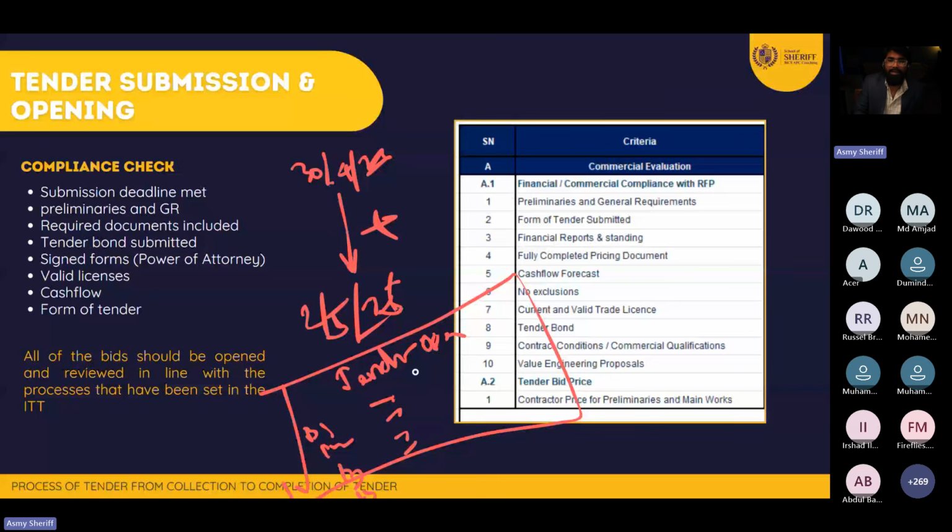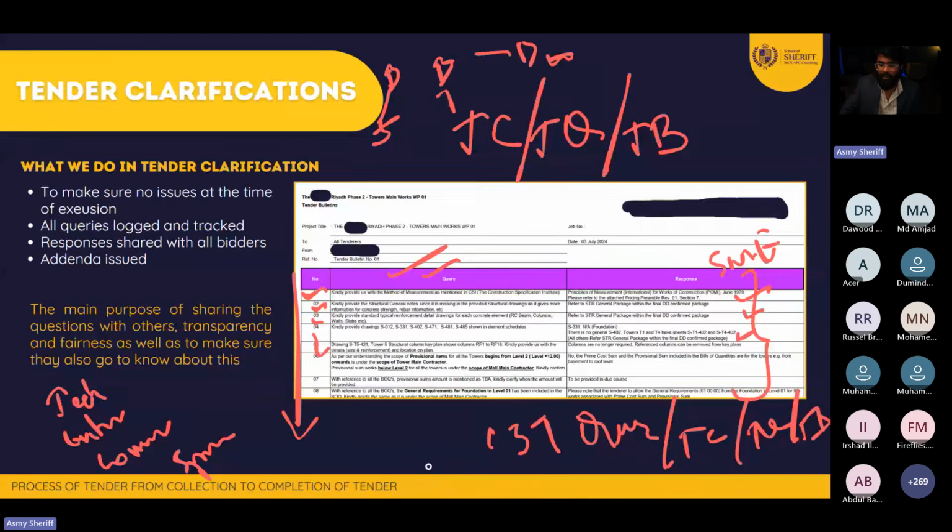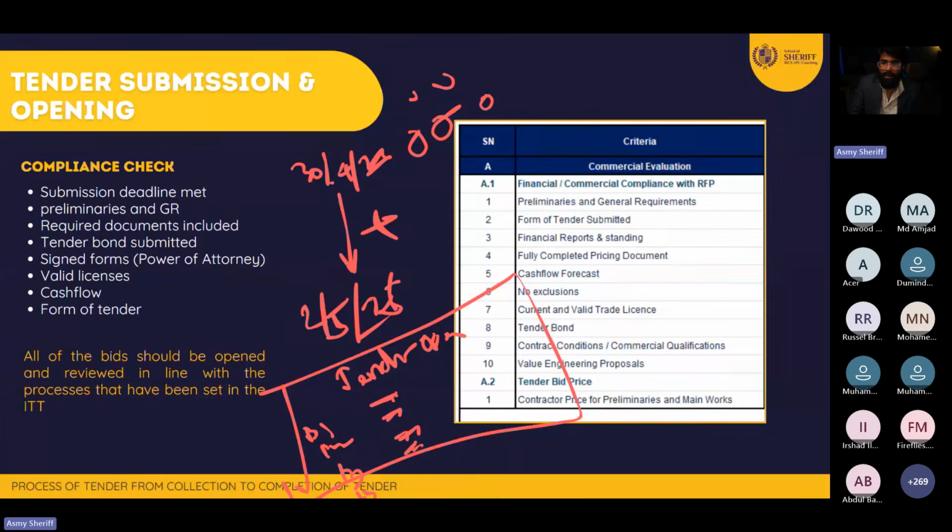So for the tender, maybe 3 or 4 or 5 important people will sit down, and in front of them you will open every envelope. The document that you receive, you will open that and you will record the numbers by pen or maybe by typing. Once you open the tender, all those 4 people who participated in the tender will sign it. For example, John, Peter, Muhammad, Abdullah, they will sign it. They will acknowledge, yes, this tender was opened in front of us, no problem. We all agree this is the number mentioned within the document.